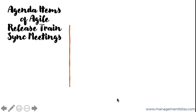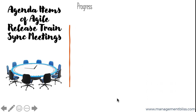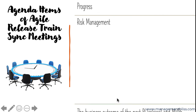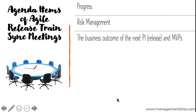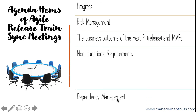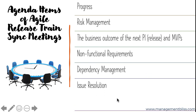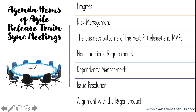The agenda items for Agile Release Train Sync meetings include: progress, risk management, the business outcome of the next PI and MVPs, non-functional requirements, dependency management, issue resolution, and alignment with the larger product.